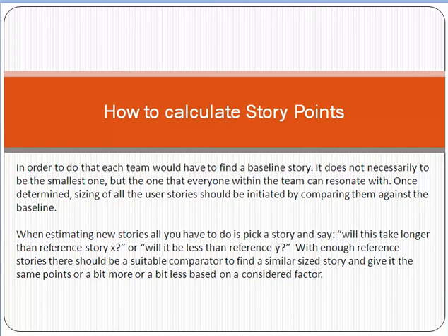For example, as a reference, you can say that requirement A has 5 points. If the requirement you are going to implement is easier or more difficult, for example, someone says that it is more difficult than reference requirement A, so you can assign it 7 points. If someone says that it is easier than reference requirement A, you can assign it 3 points.